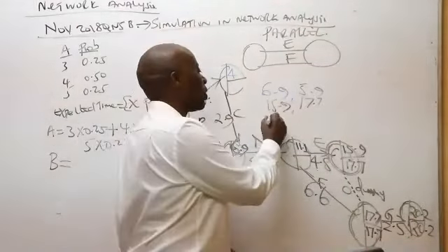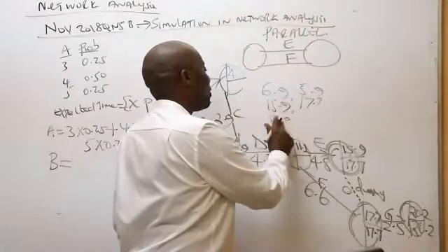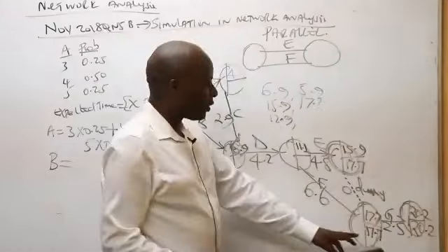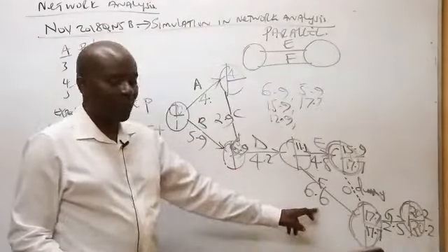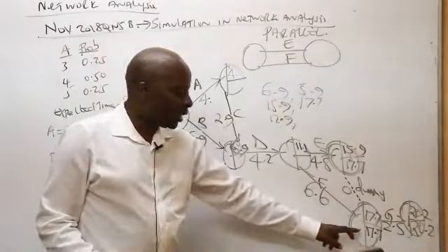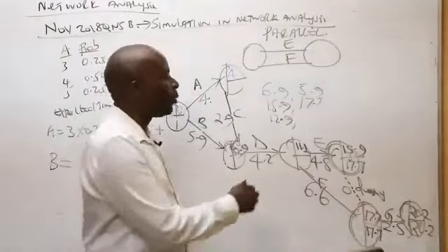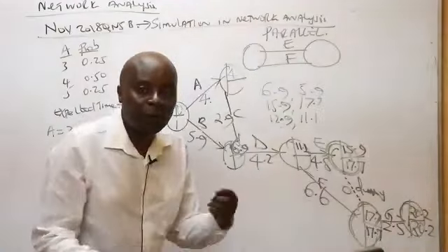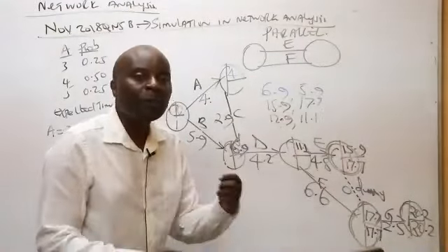12.9. Thank you very much. So I'll be comparing 12.9 vis-a-vis 17.7 minus 6.6. 17.7 minus 6.6 gives me 11 point what here? 11.1. And I tell you, as it is a backward pass, for those of us who love football, we know that a backward pass is